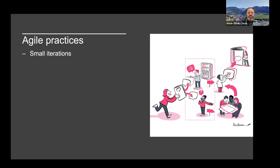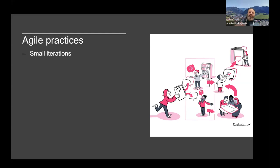Now I'll talk about some of the practices that realize those principles in reality. The first is small iterations. A really common model is called Scrum, where an iteration is called a sprint — a very time-boxed period. The job is to pick the next most important things that could be achieved in a one- or two-week time box by the team, ensuring that's a sustainable amount of work. There's also Kanban, which actually comes from car manufacturing — from Toyota, who pioneered lean manufacturing processes that have a lot of commonalities with agile software practices.